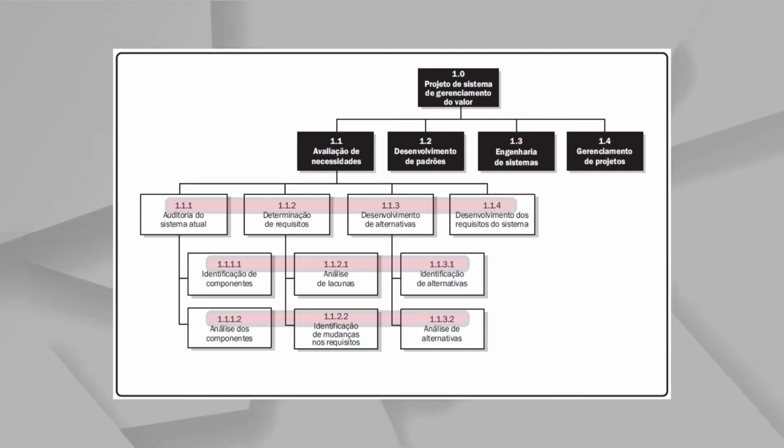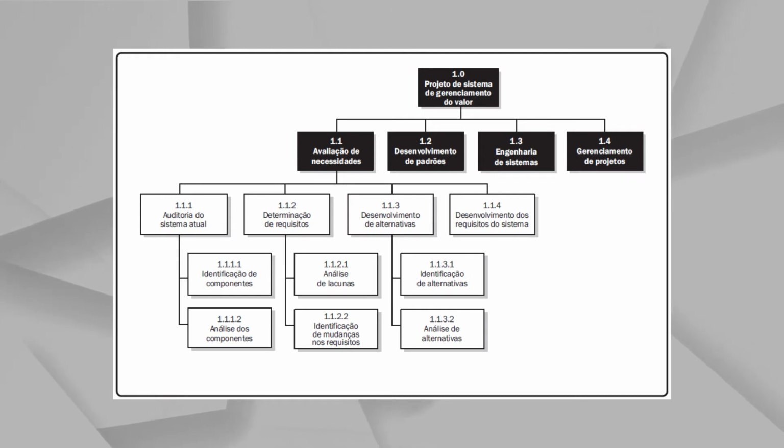Best practice says that you should not go further than 5 or 6 levels down. Usually, 5 is good enough, just like this sample that I'm showing you right here, right now. The ideas defined in the WBS are also hierarchical, in a way that if your main level starts with 1.0, the next level is 1.1. If you have 4 levels under the main level, then they will be 1.1, 1.2, 1.3, and 1.4.